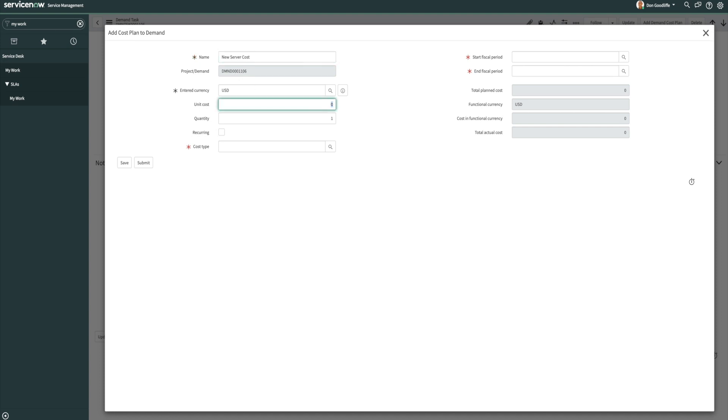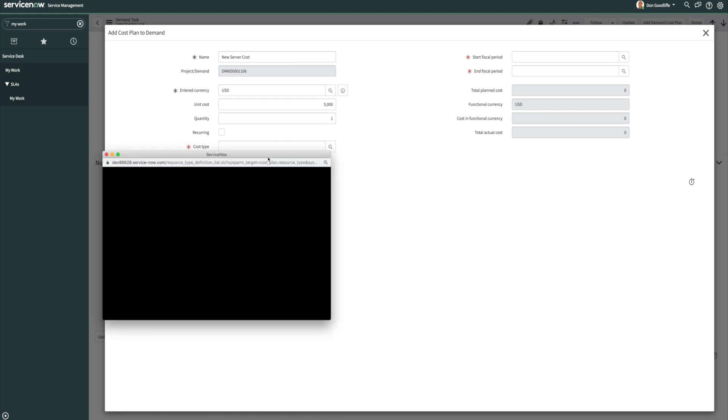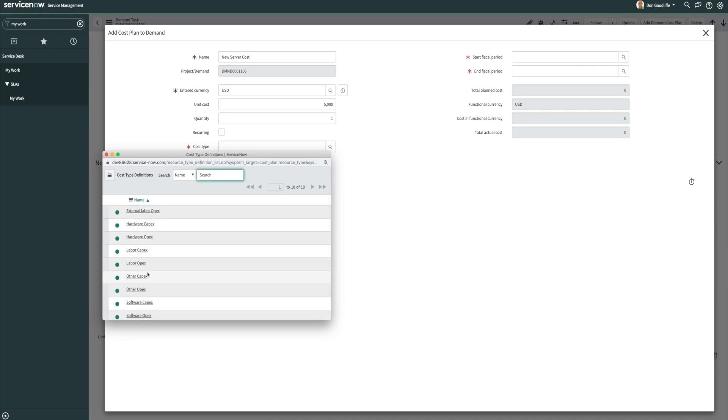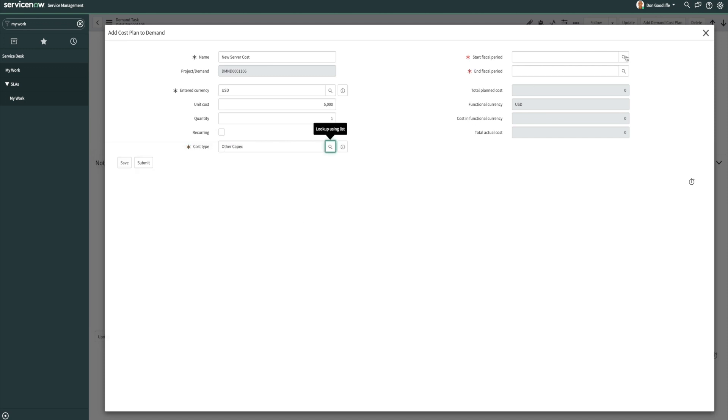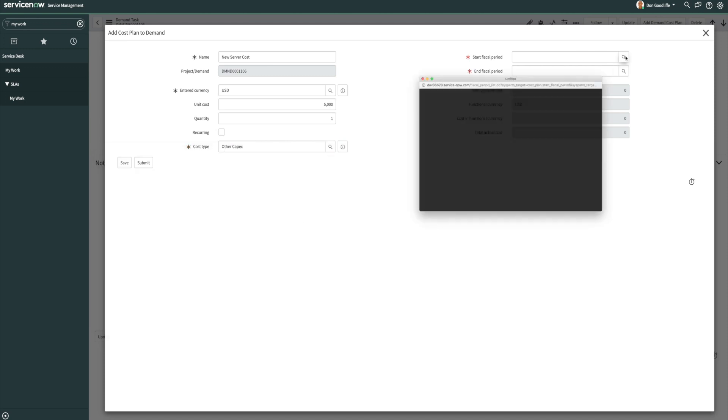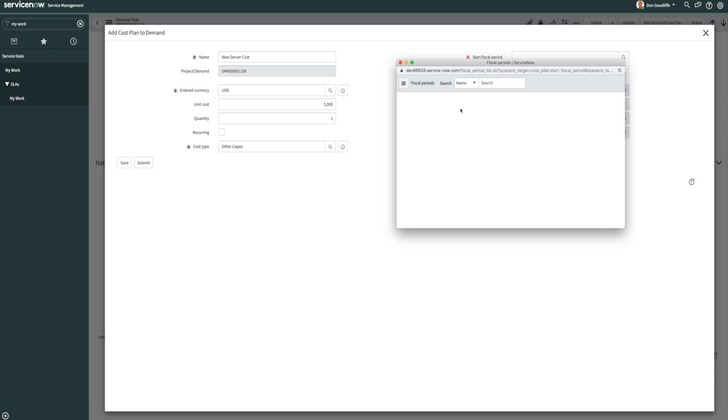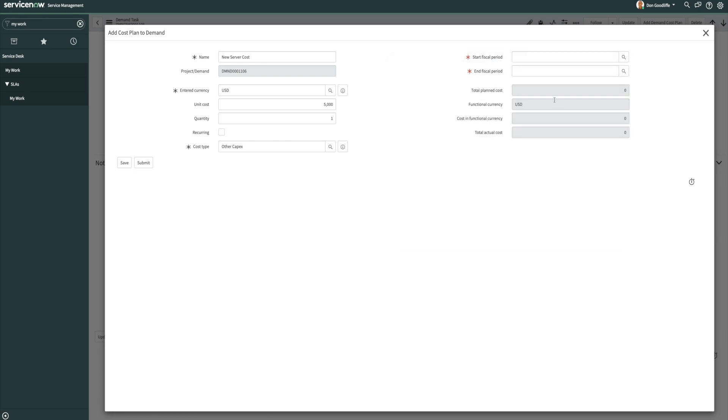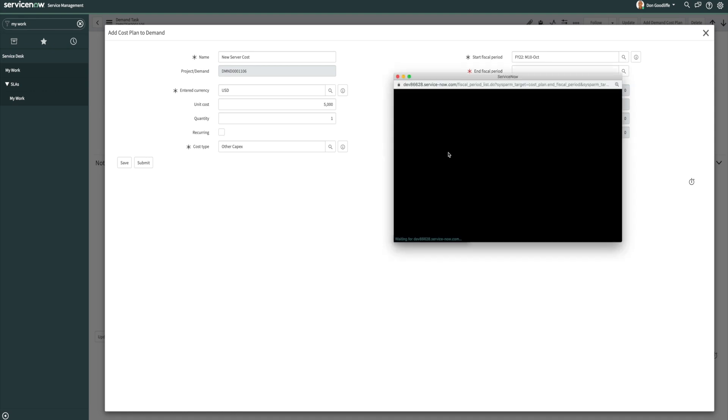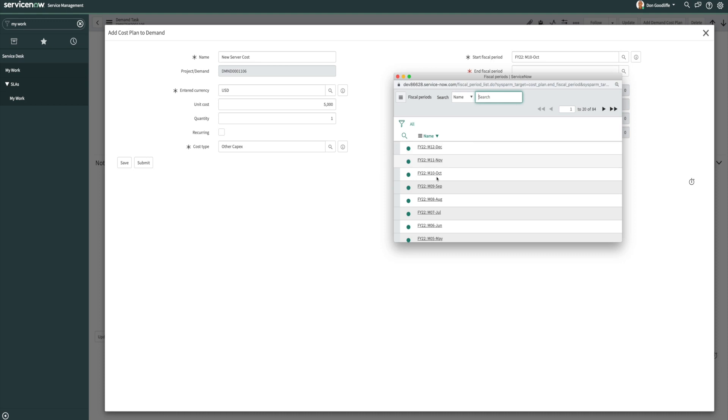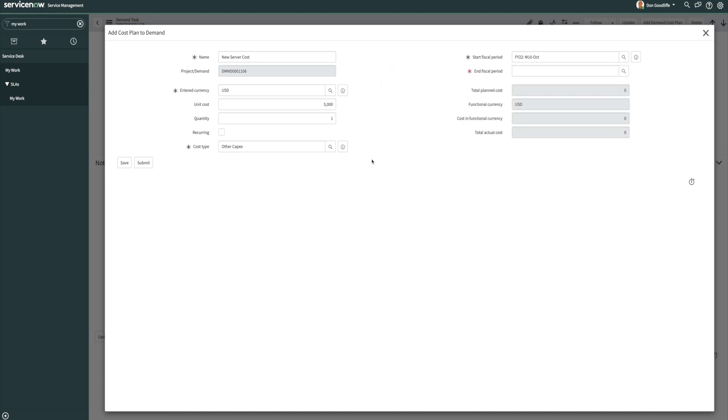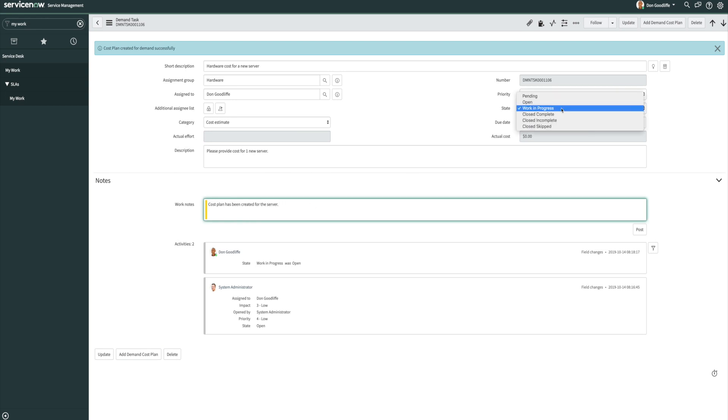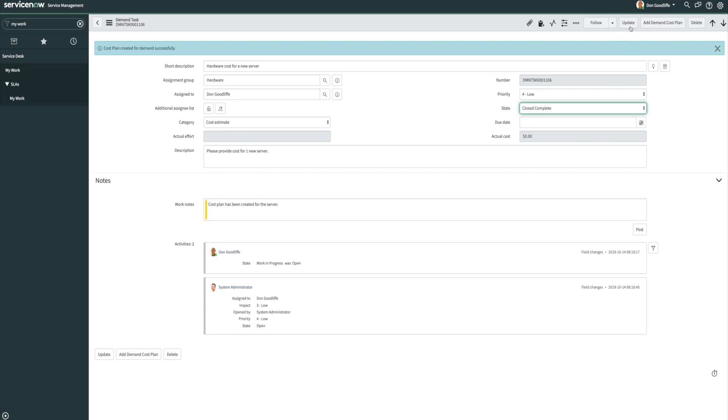So let's say this server costs us $5,000. We're only going to be purchasing one of them. And we can go ahead and put our cost type on here as well. And let's just say we are planning this to happen in October of FY22. So we can go ahead and put our fiscal period in here of when this is going to be purchased. Once we're done with it, we can go ahead and click submit, and then we can go ahead and add our work notes. And then we'll move this task to close complete and update it.